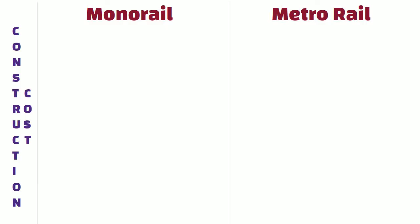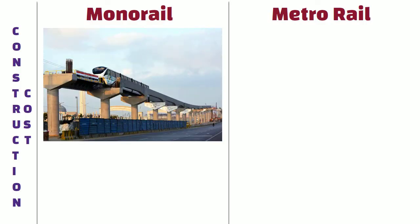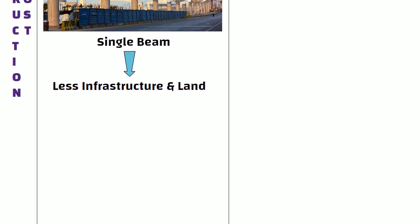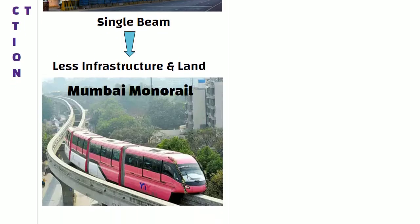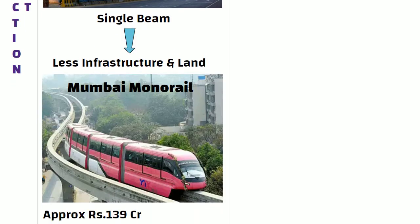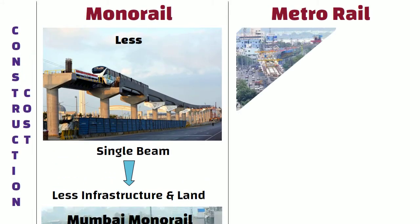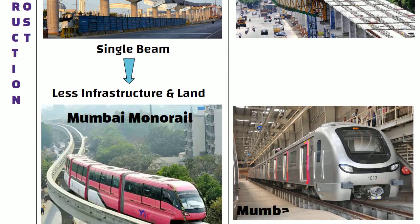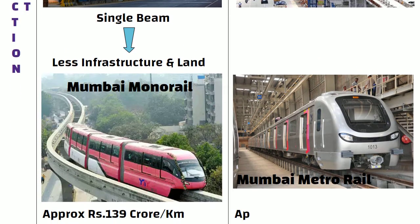Construction costs. Construction cost of monorail is less as compared to metrorail, as it requires a single beam for tracks, and ultimately less infrastructure and land is acquired. The cost of construction of Mumbai monorail is approximately 139 crore per kilometer. On the other hand, construction cost of metrorail is more — for Mumbai metrorail, the cost of construction is approximately 417 crore per kilometer.